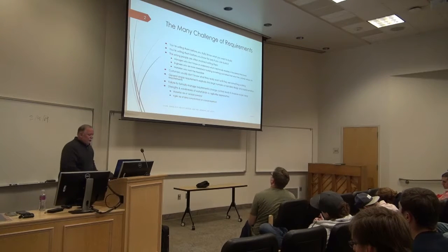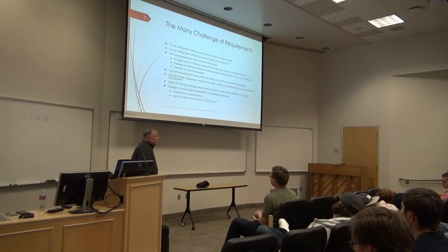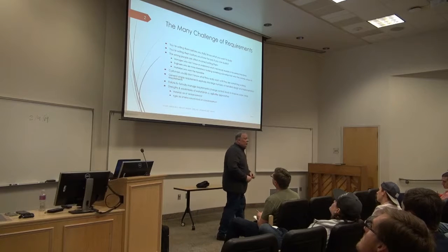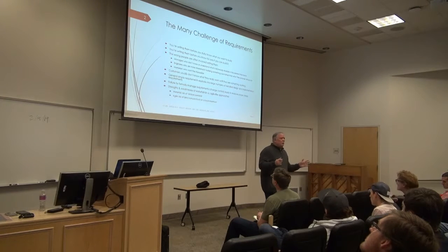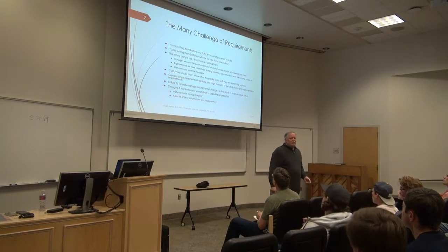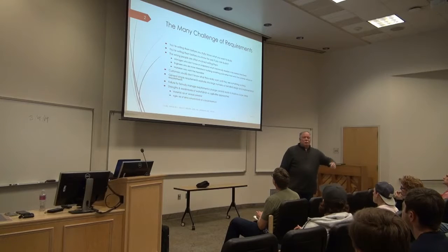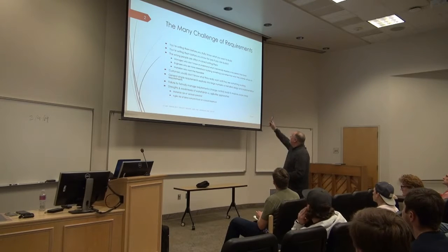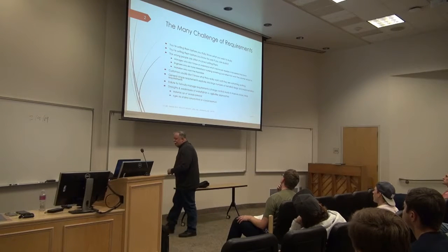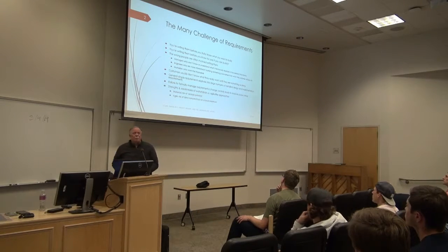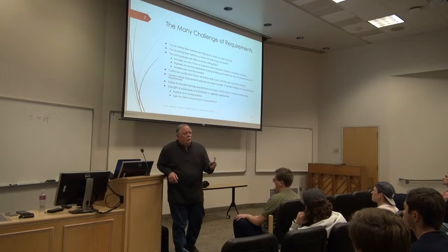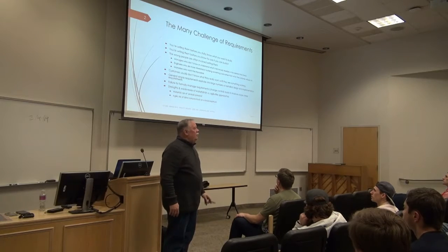Now, this is why it's so hard to write requirements. And it's why a lot of organizations will say, oh, we don't need requirements, we'll just do sprints every week, and we're sort of building the direction. And often what that does is it ends up leading you down blind alleys and you have to go back anyway. First problem is you often write requirements before you fully know what you want to build. The more inventive the thing you're building, the more likely this is to happen.